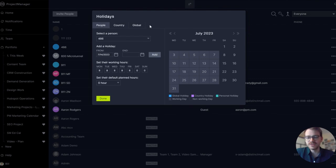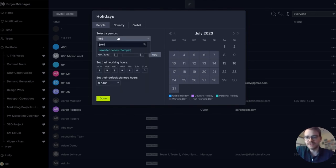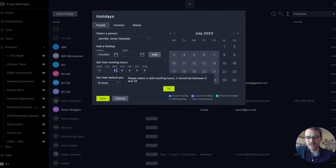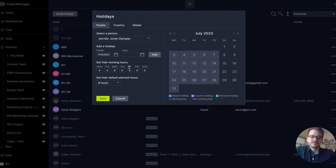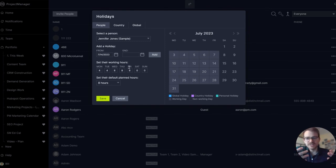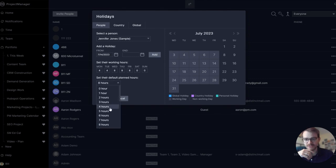Finally, you can set working hours by user. So if someone only works part-time — let's say Jennifer Jones — she only works part-time so I'm going to set her working hours to four hours per day Monday through Friday. Now when I'm building my schedule and choosing who's right for a task, I'll see that Jennifer Jones can't be scheduled for more than four hours per day. I'm also going to update her default planned hours to four as well.